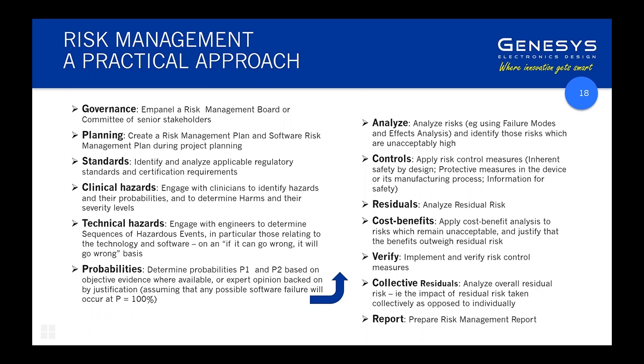And noted here that during this process, assume that software will fail. So any contribution of software to a hazard is assumed to occur. Then go through the analysis process and determine the risks that are unacceptably high.